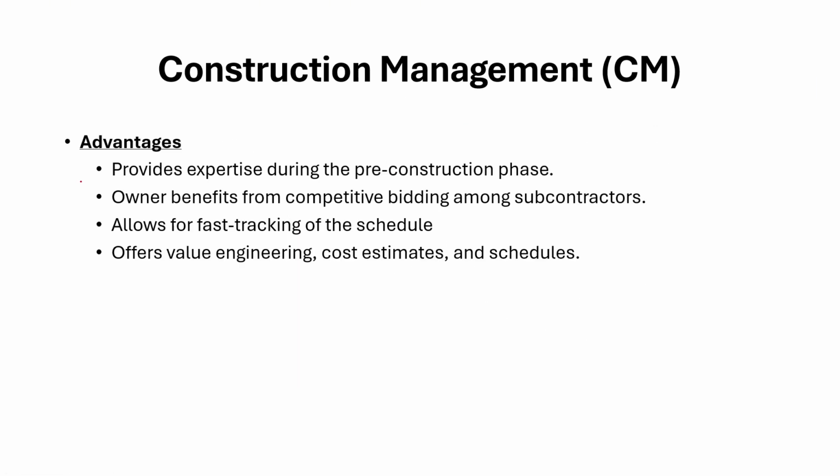Talking about the advantages of the construction management process, the construction manager provides valuable expertise in budgeting, scheduling, and risk management from the outset. So it provides expert guidance. There's competitive bidding among subcontractors that often reduces costs. The owner can make design or scope adjustments during the project with the CM's guidance. It also offers value engineering, cost estimates, and schedules. And with CMAR, the owner benefits from the construction manager assuming financial risk for overruns.